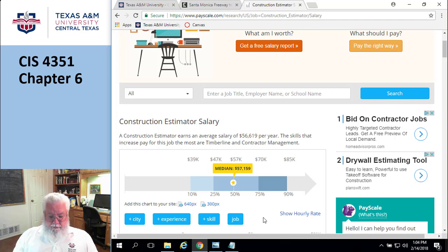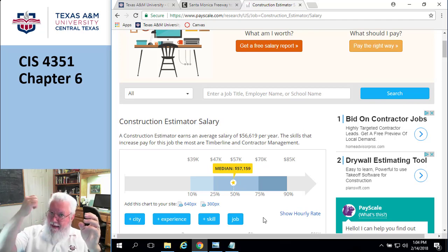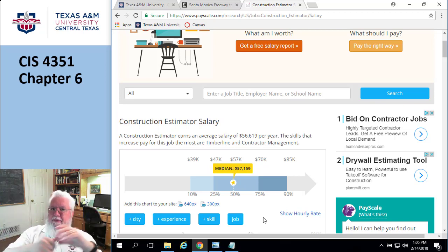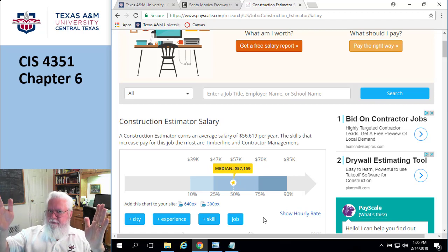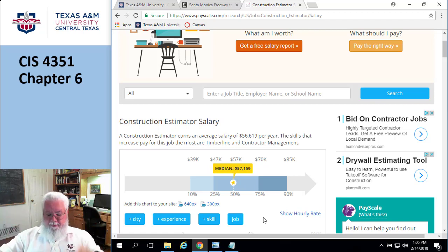So the duration is the actual amount of time, like in reading a book. It's only going to take me 6 hours to read this book. I just can't do it all in one day. I can only do a little bit. It's going to take me 2 weeks to read this book. Although the amount of clock time, the stopwatch time, the amount of effort time is going to be like 6 hours, I'm not going to tell them I'm going to do it in 6 hours. I'm going to give them the elapsed days. Okay. All right.